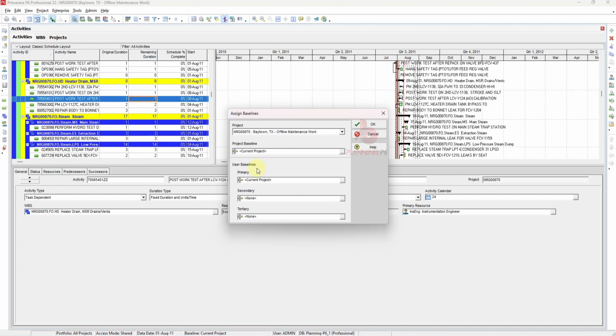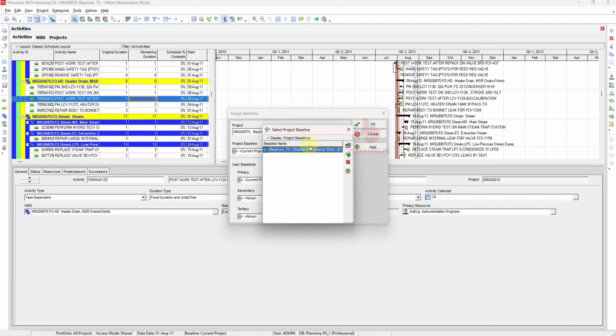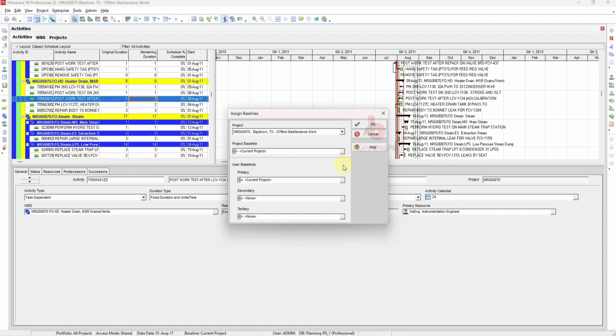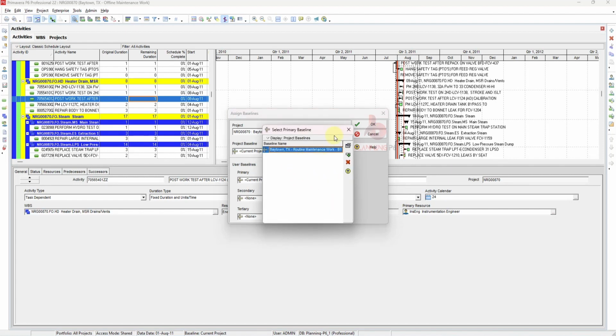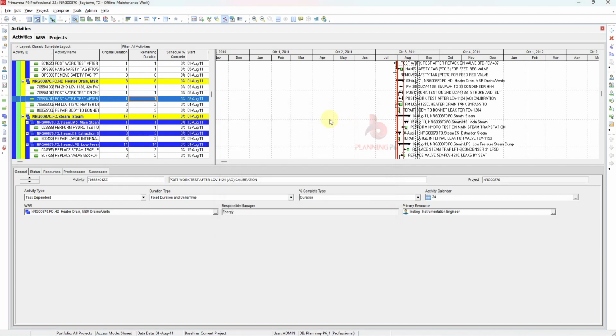there was a list of baselines over there that we had to select from, but now they have introduced a new dialog box where all the baselines are located. You can choose your own baseline which you have maintained for this project, even if it is not in use. If you have 3, 4, 5 baselines, they will all be shown. This dialog box has been added in the baseline option. So this is also a new update.